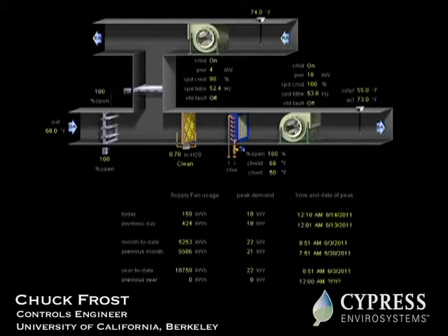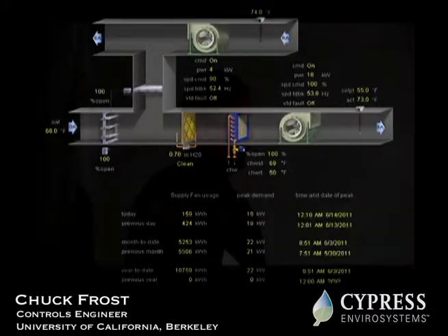And if you're trending a lot of data, and the other thing is, with the new systems, you can grab a whole lot of data now, and you want to make sure you're going to put it somewhere that's useful. Otherwise, you just get a lot of stuff, and it's unorganized, and it's not useful, and it can, depending on the system, slow the traffic on your network and slow down the system if you're trending too much. I actually like, in the beginning when I'm speccing a job, to have to monitor all points, because I know it typically forces some better controls sometimes, because in order to handle that traffic, they'll put in the higher end controls when they're bidding on a job.